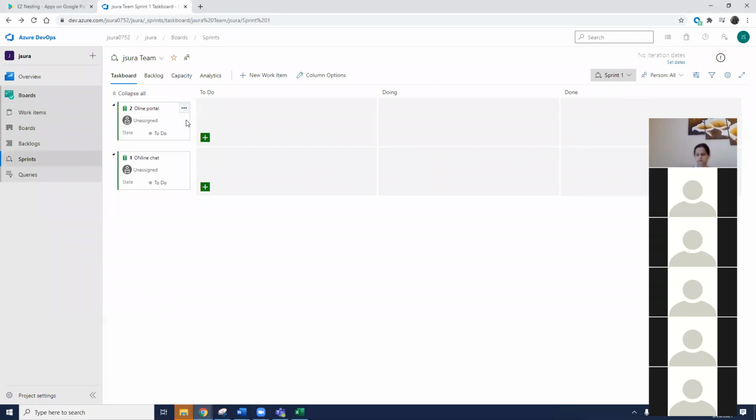All right, so when you are starting a sprint and you have user stories, all the user stories will be in ready status, which means it is ready for the development team to start working on. Before they start any development work, we have to do analysis from our side and create these user stories, these tasks for them. This will be about 15-20 tasks per sprint, or 40 tasks, depending on your team's size and the size of the task that you're assigning here. These are called user stories.